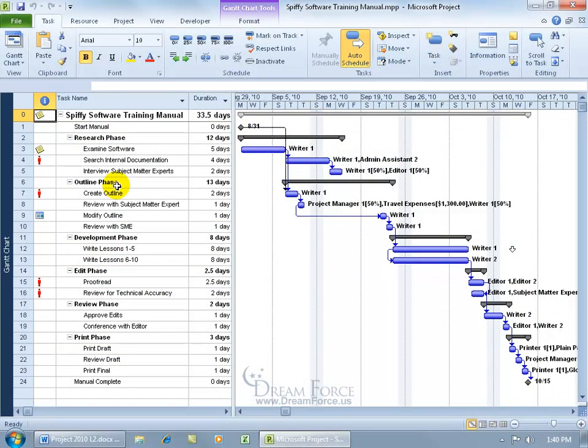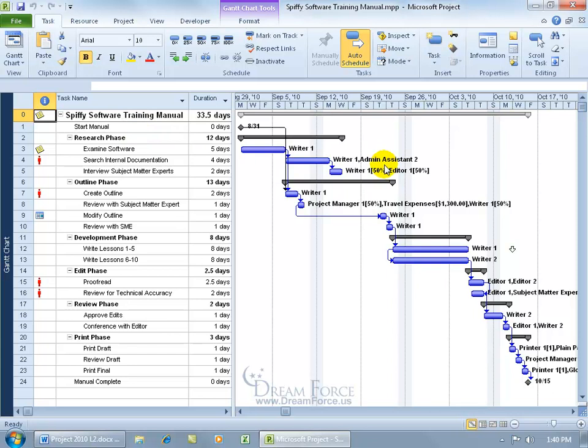Once you have your project plan set up and ready to go, as we went over in all the previous training videos, you need a list of all the tasks needed to be completed in order to complete the project goal, which in this case is to create a Spiffy Software Training Manual. Over in the Gantt chart, we have a list of all the resources next to the tasks that they are assigned to, and don't forget to set a baseline to take a snapshot before you begin the project.